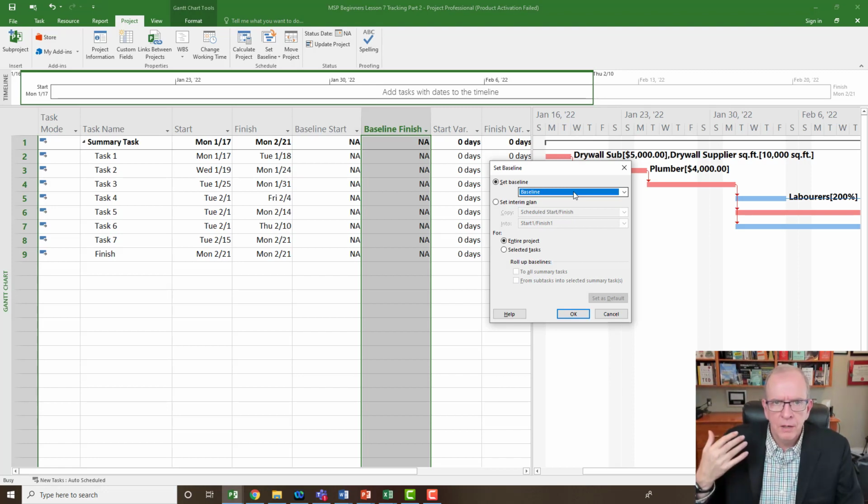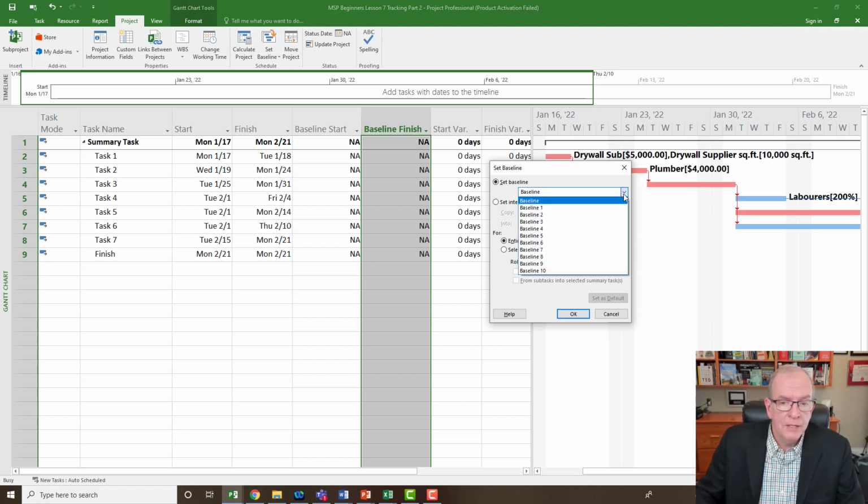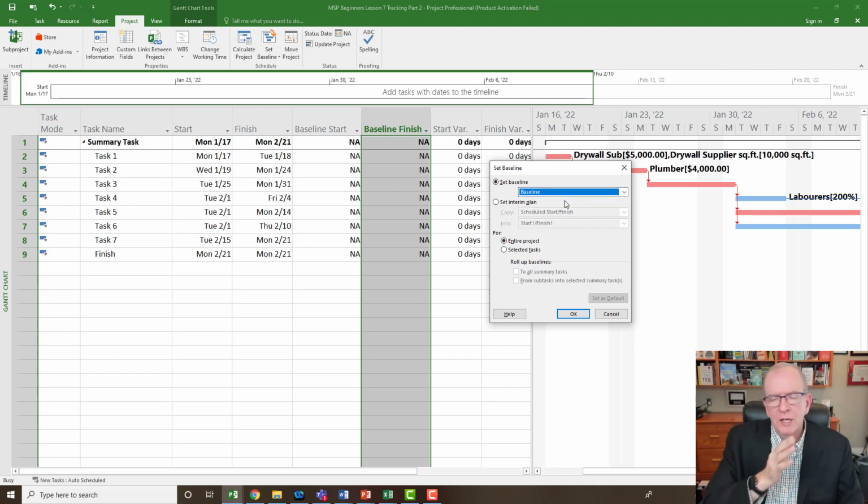My background, I'm a professor of construction management and large construction projects. Number one, we have a lot more than 11 updates that we do typically. You know, construction projects can run many, many months over years, and 11 isn't going to be enough to cut it. And there's a lot of jumbling around that you have to do in between. So we generally create a baseline and we stick to it unless there's some major change. And then if there is some major change at that point, we might re-baseline the schedule. For now, I just want to baseline the entire project. So stick to the default.